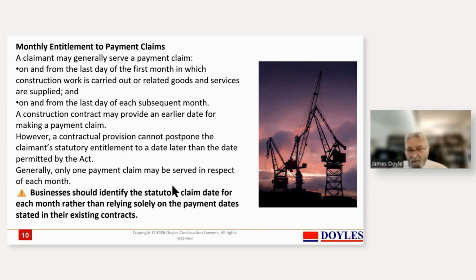But if any of them approach a payment claim and you've made it earlier, and then you make another one, and the second one is the real one, it's the well-documented and detailed claim, effectively it mightn't have any bite, because it might be excluded because you've made an informal payment claim earlier. So you've got to make sure that your accounting staff are pretty well briefed on the Security of Payments Act, because it's their job probably to put out much of the payment claims. They should make sure they satisfy the requirements of the Act, and they make sure that they don't do it too enthusiastically, because if they issue more than one, you disqualify yourself.